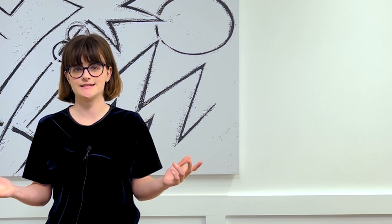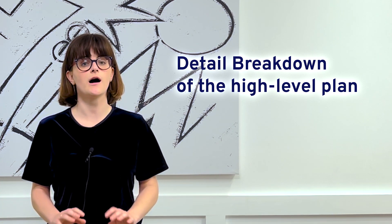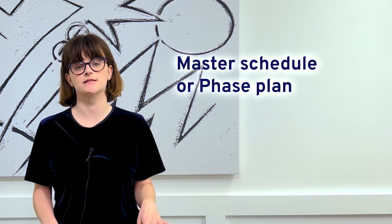So, what is a look-ahead? To put it simply, it's a detailed breakdown of your high-level plan, which can often be called a master schedule or a phased plan. A look-ahead zooms in on what is happening in the near future — sometimes looking at the next three weeks, sometimes looking at the next 12 weeks, or anything in between. This focus lets teams detail out what actually needs to happen in order for different parts of the project to progress, which allows them to prepare goals and activities for the next few weeks.